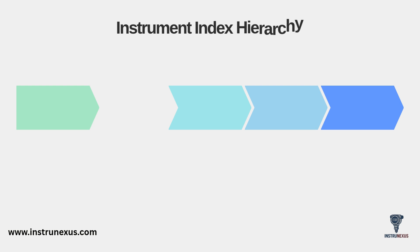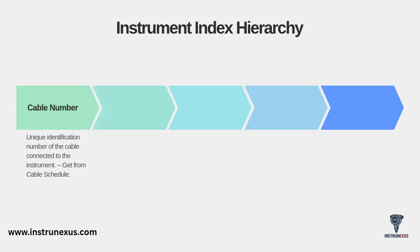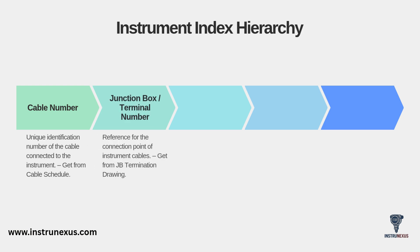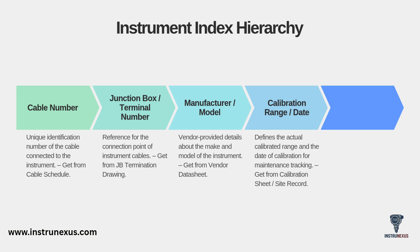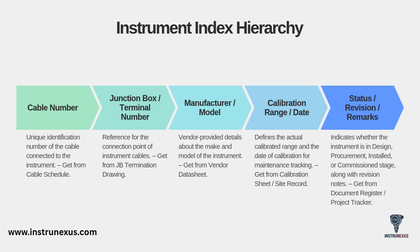The last part of the hierarchy covers specific connection, procurement, and maintenance details. Here you'll track the cable number connected to the instrument, obtained from the cable schedule. You'll list the junction box and terminal number as a reference for the connection point, from the JB termination drawing. As the project progresses, you'll add the manufacturer and model from the vendor data sheet. For the full life cycle, you'll track the calibration range and date for maintenance tracking, and the status — is it in design, procurement, or installed? This, along with revision notes, comes from your project tracker.